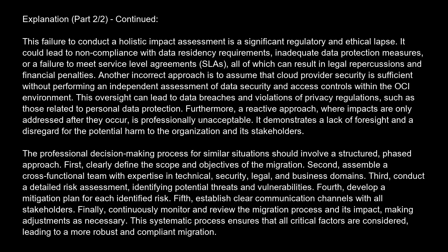Fourth, develop a mitigation plan for each identified risk. Fifth, establish clear communication channels with all stakeholders. Finally, continuously monitor and review the migration process and its impact, making adjustments as necessary. This systematic process ensures that all critical factors are considered, leading to a more robust and compliant migration.